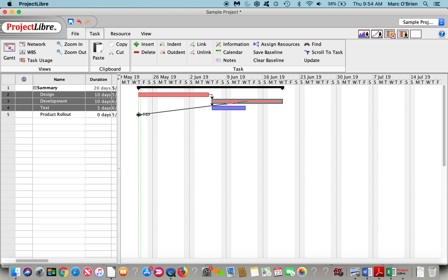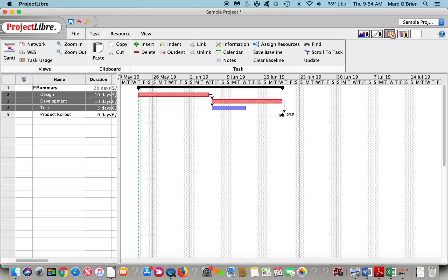You can see there's a difference in coloring here now that I've got two tasks in parallel. ProjectLibre creates a critical path methodology where you can see which tasks are on the critical path and which have float to them.